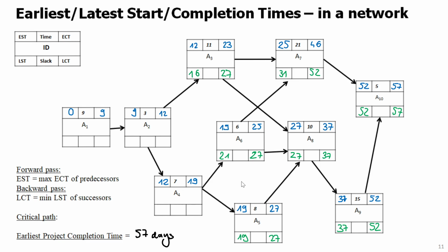So first this, it's a backward path going from the end back to the beginning. So here, the minimum of 21 and 19, this needs to be 19, minus 7 will be 12. Again, earliest and latest are the same. And here, the minimum of 16 and 12 is 12, minus 3, 9. And then this 9 minus 9 becomes 0. And it's very important that this number right here should be 0.